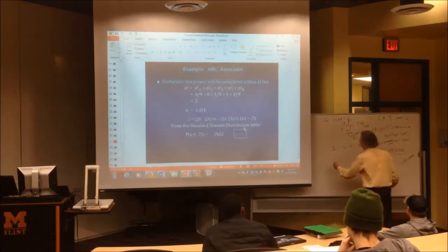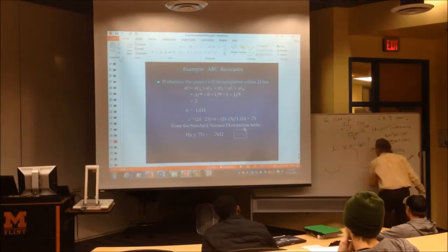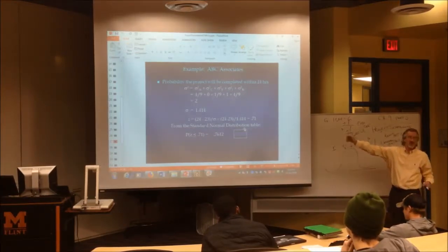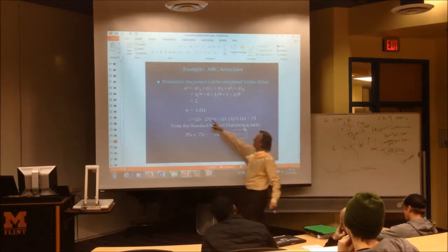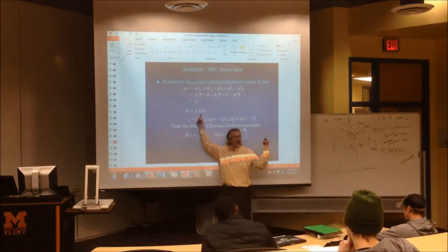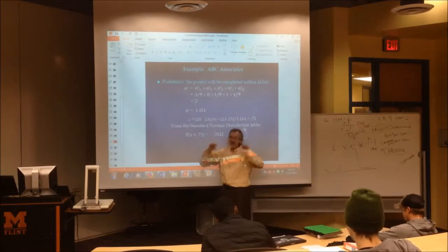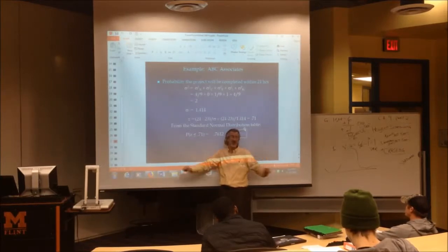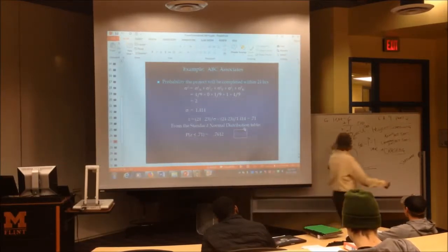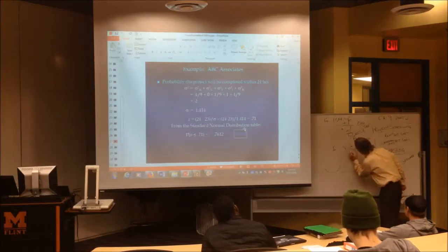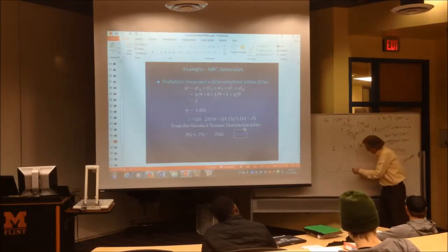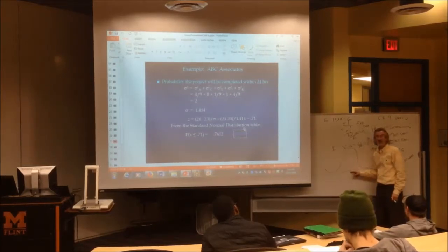I always draw this bell curve, and then I make a number line that fits the information. So as soon as I have that standard deviation of the project, I make this number line where each of my dashes is exactly 1 standard deviation above the expected time, or 1 standard deviation below, 2 standard deviations, 3 standard deviations. Because the empirical rule says, right down the middle, 50% to the left and 50% to the right, this is your project expected time right here.